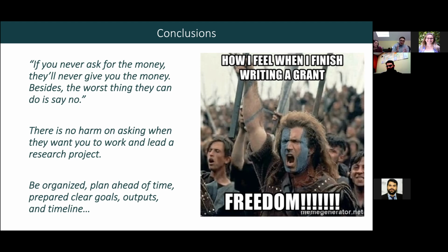It could be maybe for another seminar, but there is something that we call a timeline, where you basically specify your objectives and the time that you're planning to achieve them. So if your first objective was to do a literature review, you will say, okay, I will finish that in the first year. By the first year report, you are expected to tell the sponsor that you finished, or if there was a delay, why there was a delay. And if the delay is not accepted by the sponsor, you can lose funding.